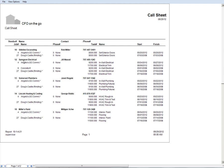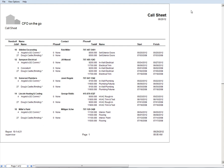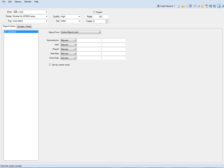I want you to call all these subs and advise them that this is when they're expected to be on these jobs. And they basically take two highlighters, a green one for the ones that they accept that they will be there, and then some other color, blue, orange, pink, for the ones that they're not going to be able to meet. And those are the only ones that somebody has to follow up on. But this all can be done by somebody at a much lower pay rate than the project manager. But this can all get done electronically as well. So that's that.